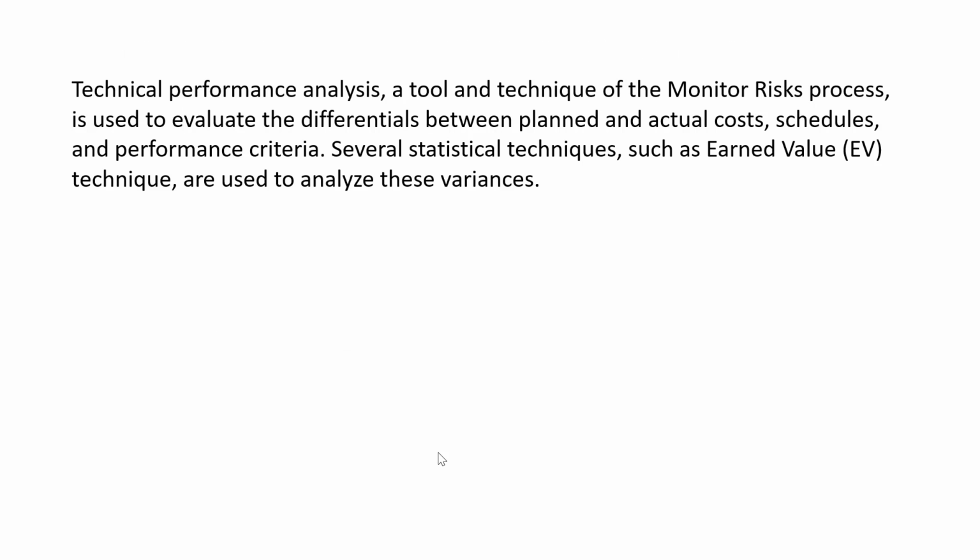Technical performance analysis is a tool and technique of the monitor risk process. It is used to evaluate the differential between planned and actual cost, schedule, and performance criteria. Several statistical techniques, such as earned value technique, are used to analyze these variances.